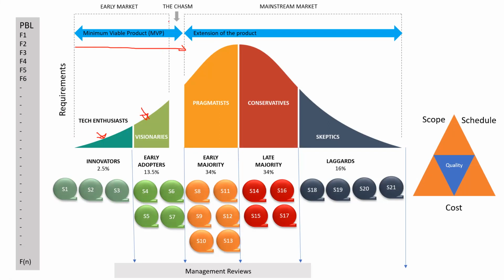So here we have the minimum viable product ready. Here all these fixed price contracts will not work. Maybe cost reimbursable with an upper ceiling, or just cost reimbursable contracts. That is what is really required while doing this minimum viable product. Because in this phase, if you sign a fixed price contract, that itself will act as a constraint for agility.